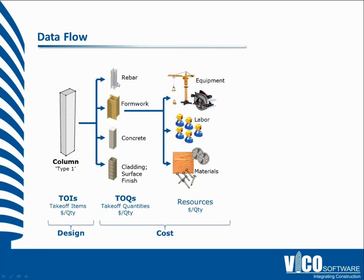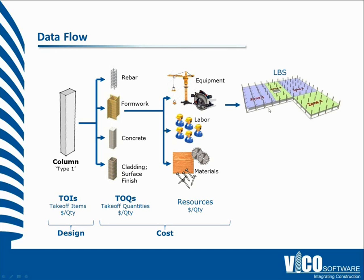This layer does represent tasks, but it's too granular for the way we want to plan and control schedules. If we had 500 columns in the project, you wouldn't want to have four methods for each one — you wouldn't want to have 2,000 tasks to track. So we needed to aggregate these back together to match how you really do plan construction today, and we do that by adding zones to the model.